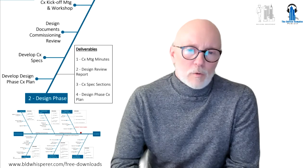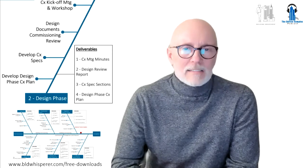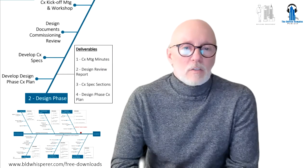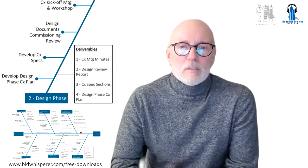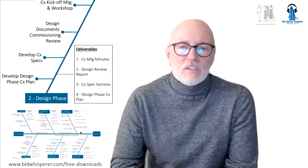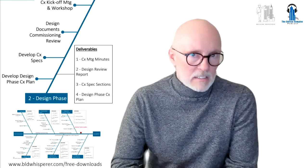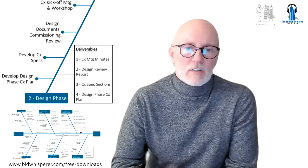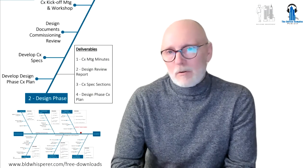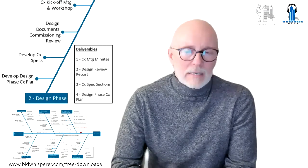So that review is done, the report is issued to the design team, and the design team and the engineer of record choose to react to it or not. That is their prerogative because they are the design engineers of record. The other thing that goes hand in glove with that is item number 3, developing specification sections. A good commissioning firm will have very clear, concise, current, up-to-date, well-written commissioning specification sections, testing and balancing specification sections, and O&M manual specification sections. They should be offered to the design team and provided, and the design team can choose to make them their own or not. But the idea here is to make sure the spec covers everything completely and utterly.